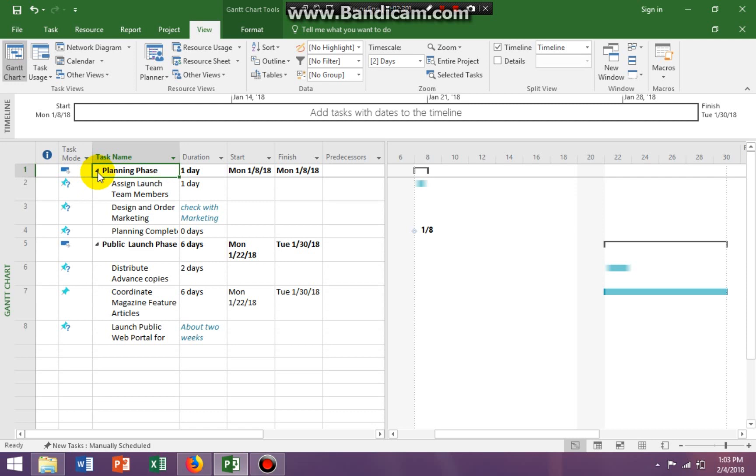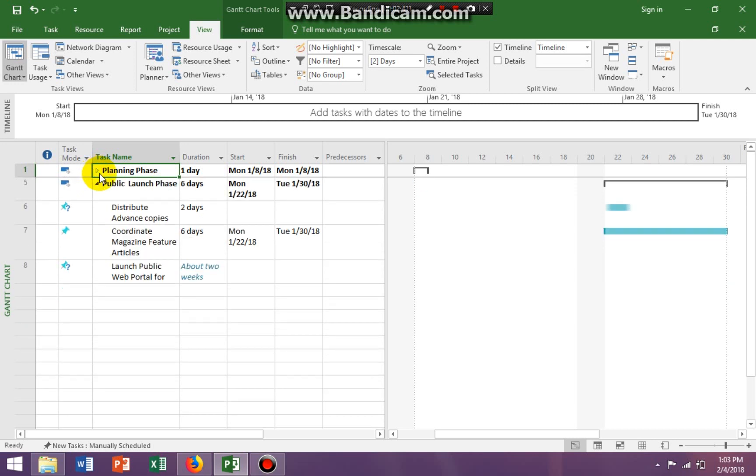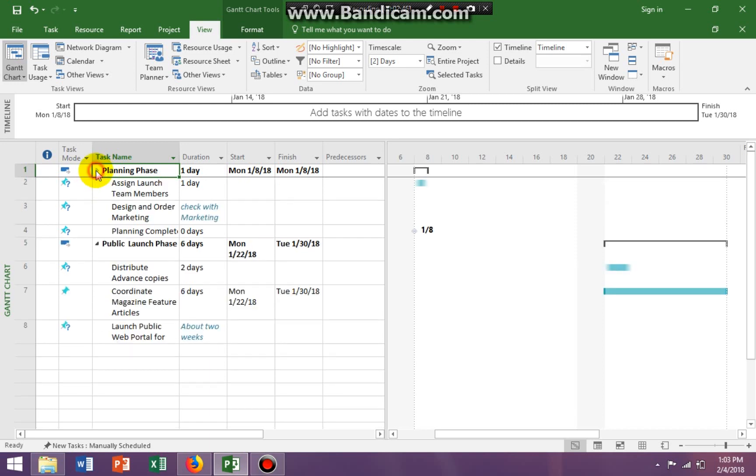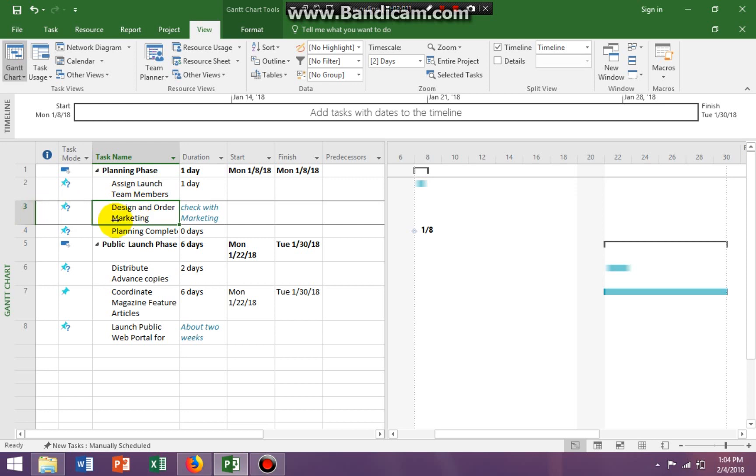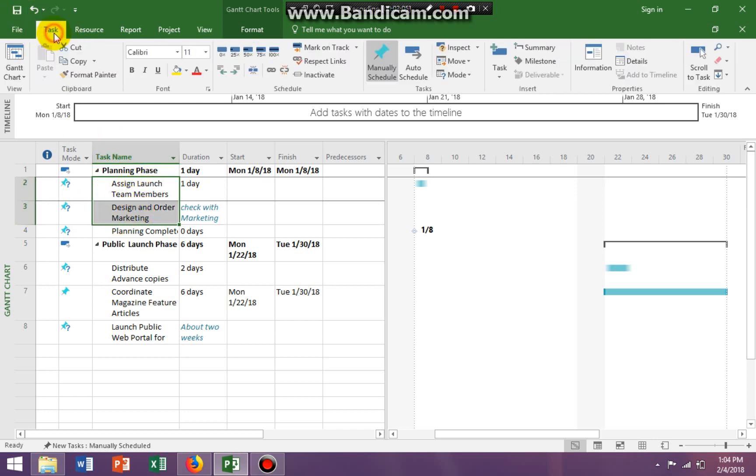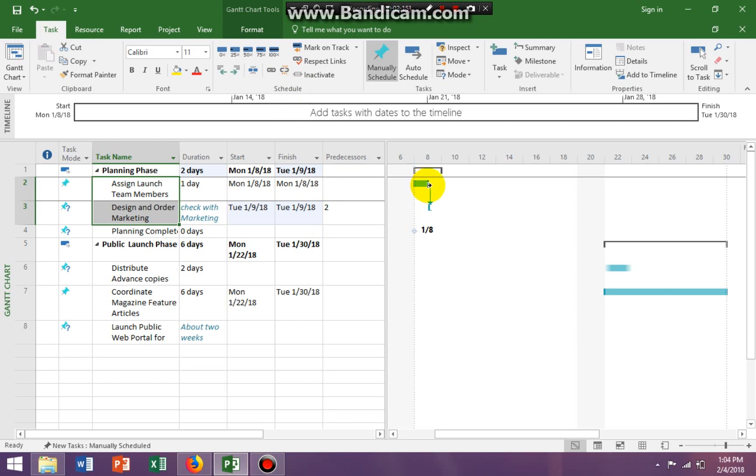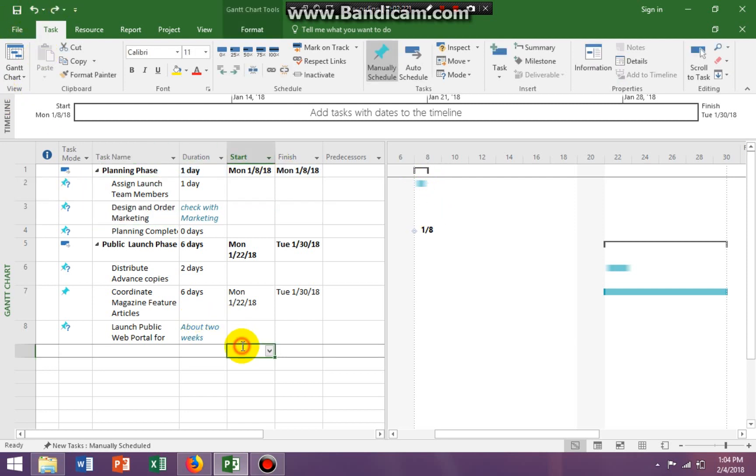So our next step was to enter an ID, the task ID, in the predecessor field. So I need to link these two tasks, 2 and 3, together. Now, I can link them this way by highlighting them, going to my task tab and clicking on link. It gives me a 2 because task 2 is, when task 2 finishes, task 3 begins. So that's correct. But I'm going to undo this because your book is asking you to do it a different way.